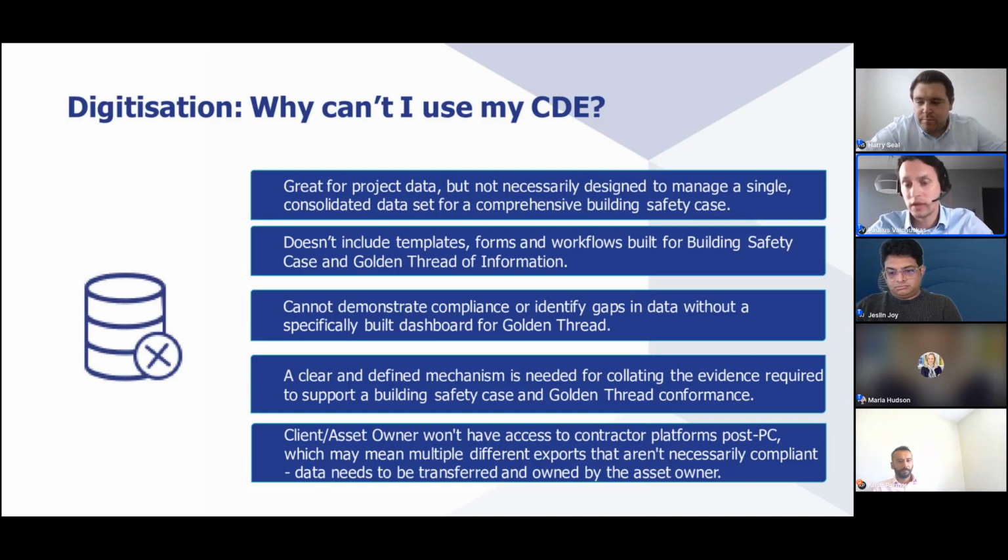And also thinking about access post project completion. If you are a contractor responsible for handing the building over, you can give the client limited access to your common data environment, but once the project is finished or once the defects period is done, all that information needs to be owned by the responsible party, needs to be submitted to regulators on a regular basis, and needs to be kept updated and live.